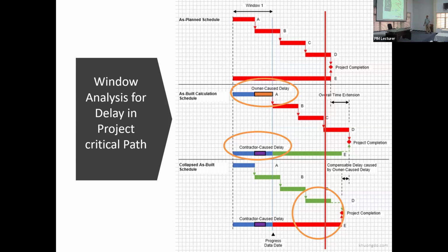Very simple case. Now, on the other side, the construction is going on. There is a strike on the contractor's staff. Labor is on strike. Now, who has to pay for it? The contractor has to pay. There's no question. So there is a delay, no question about that. It has gone beyond the red line. But this part here, where the contractor's strike happened, now gets extended. So that part, the contractor has to pay. Now that is clear. This is a very straightforward case.